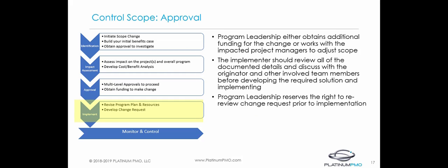As part of the development approval stage, the change request has been funded and a development manager has been assigned. As part of the preparation, the development manager will go through the impact assessments and the requirements of the change and lay out their detailed plan. Depending on the thoroughness of the impact assessment, this can be an easy or difficult task. The development manager will rework their project plans to account for the additional work and get the work going into